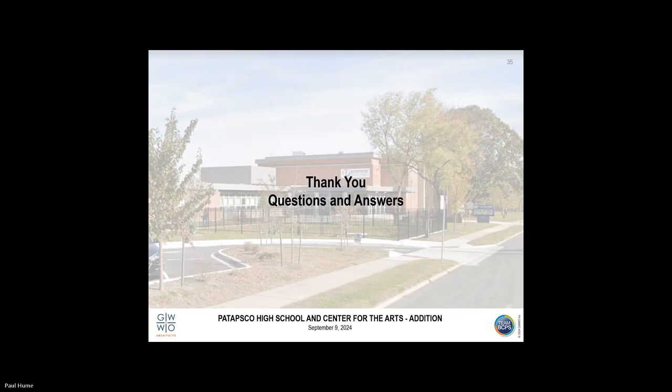Thank you. Yep. Thank you, Mr. Hume. And I would just add too, it's really important on projects of this scope that summertime is very critical for us, as Mr. Hume said, because the building won't be occupied during that time. So it's an opportunity for us to be able to do things that we would not normally be able to do when the building is occupied.